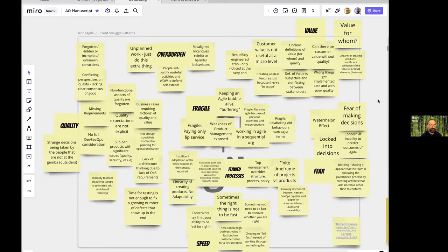The other thing we've noticed is quality. Quality is usually squeezed at the end of a project. Those poor testing people. I've been there, I've done that. If you run into problems, the deadline doesn't shift, but the time for quality control and quality assurance is reduced. So they sacrifice quality in order to meet the budget, scope, and time constraints.